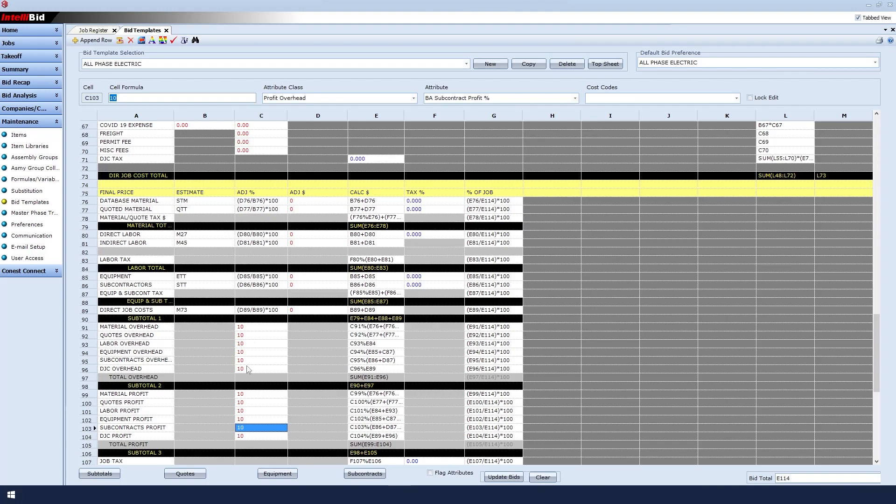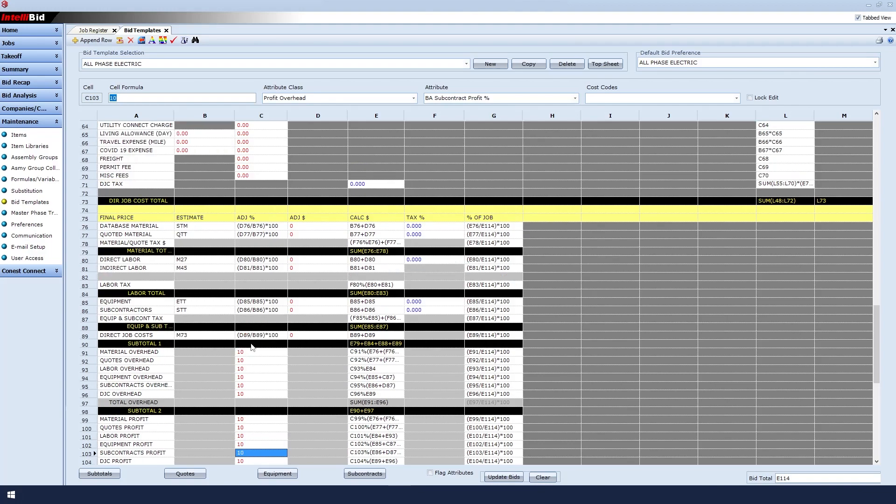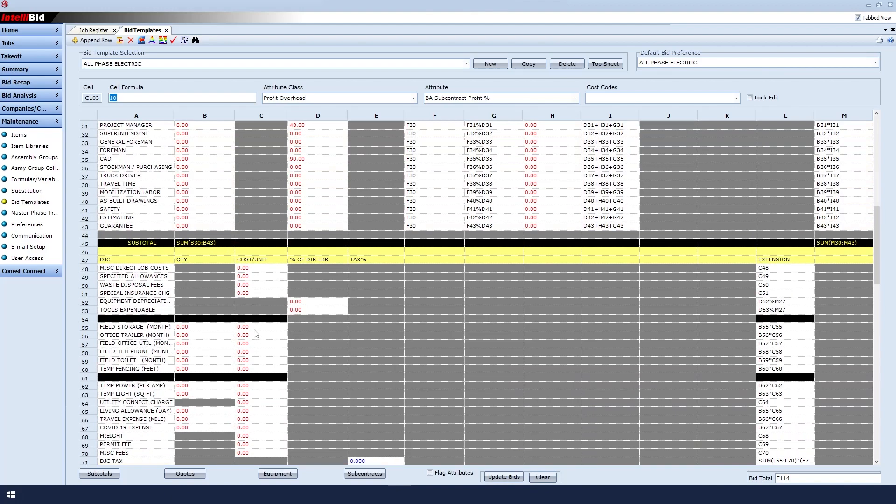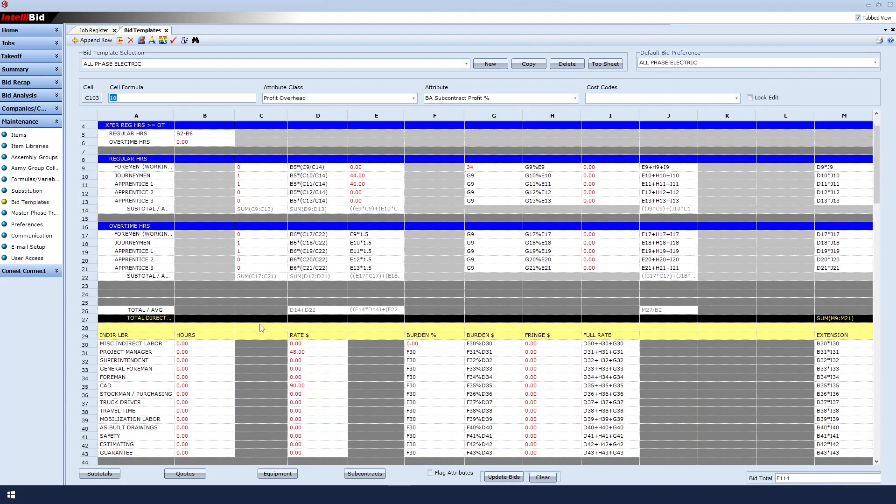When a value is in red, it means that you still have the opportunity to override the value at the job level, if necessary.